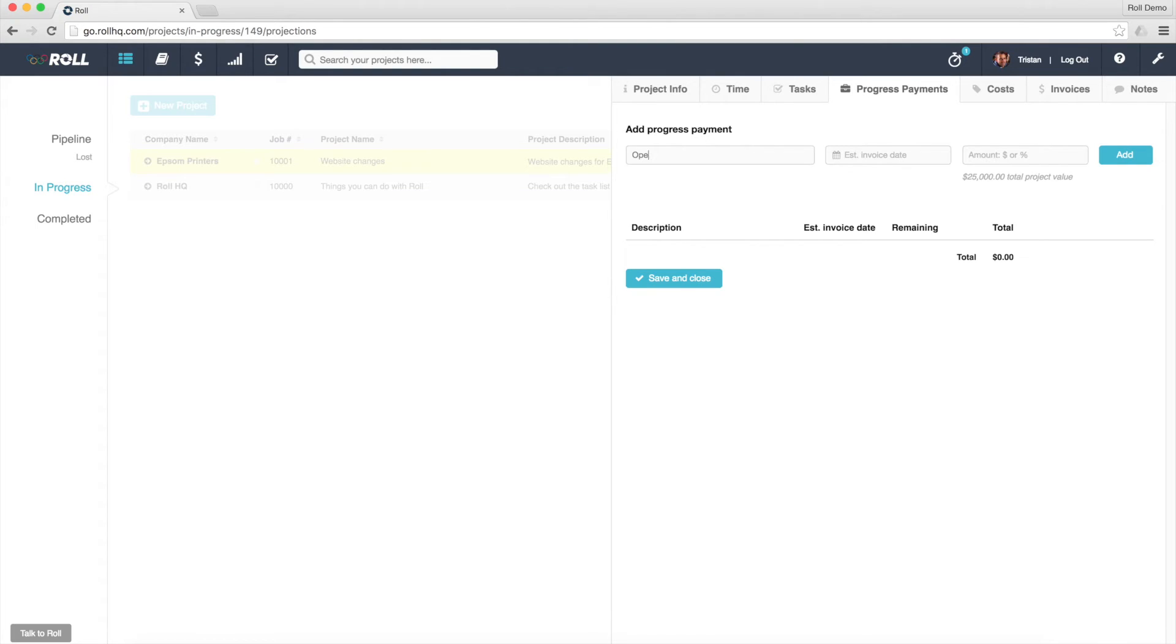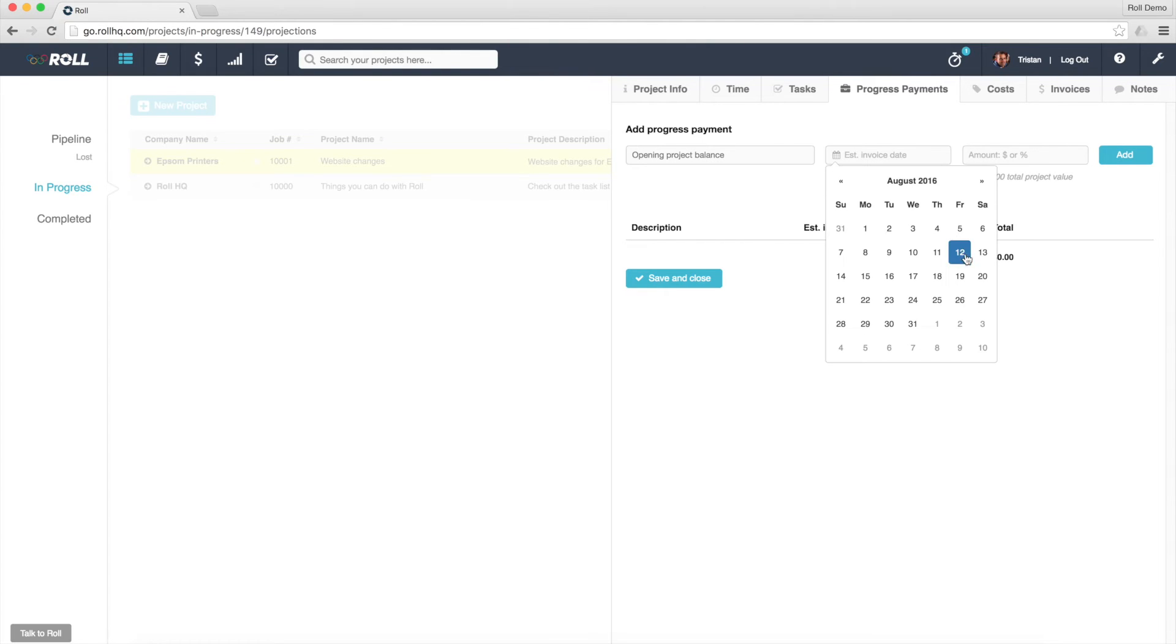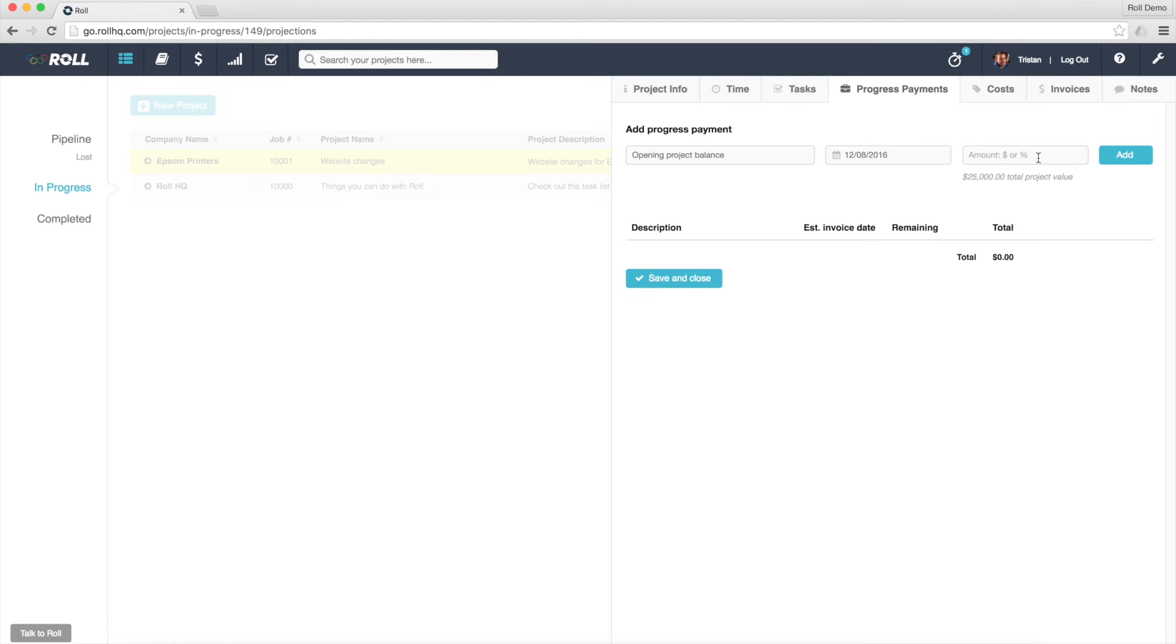I'm going to call this Opening Balance, actually Opening Project Balance, so I know that this was just me effectively entering the opening invoicing amounts. Let's just go 50% of the total and add that in.